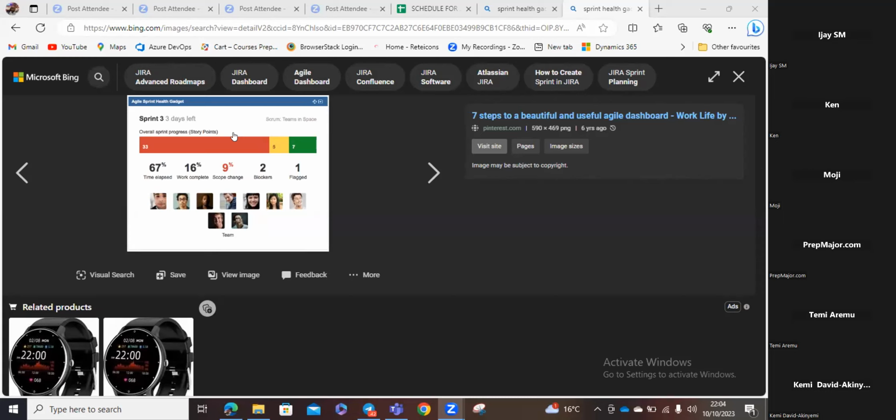And even the things now, we've put a thing in place whereby developers can't just bring any story in and then explain it during stand-up. It has to go through the dev lead, and the dev lead has to make a decision to say, am I approving this to go on? And that decision is made with him having a meeting with myself and the PO, where we sit down to say, oh, you brought this in. Do we need to do it now? What is the timeline in the roadmap for us to actually do this?